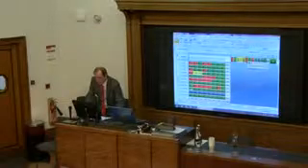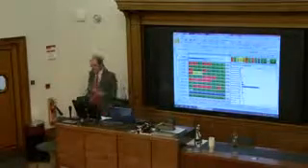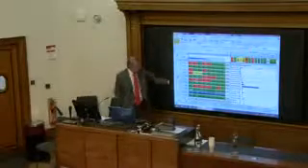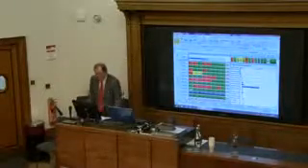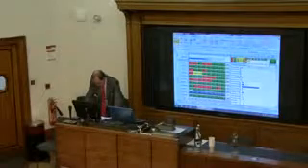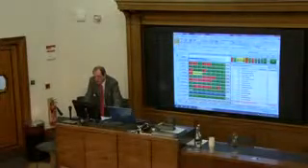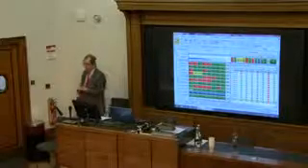I've got high float. I want to know which activities have got high float. Therefore, by clicking on the high float metric, it will just list all the activities that have got high float. I can display that either as a Gantt chart, or as a complete list of activities, or as a scorecard, where when you set your metrics up, you can apply some weightings to each metric.